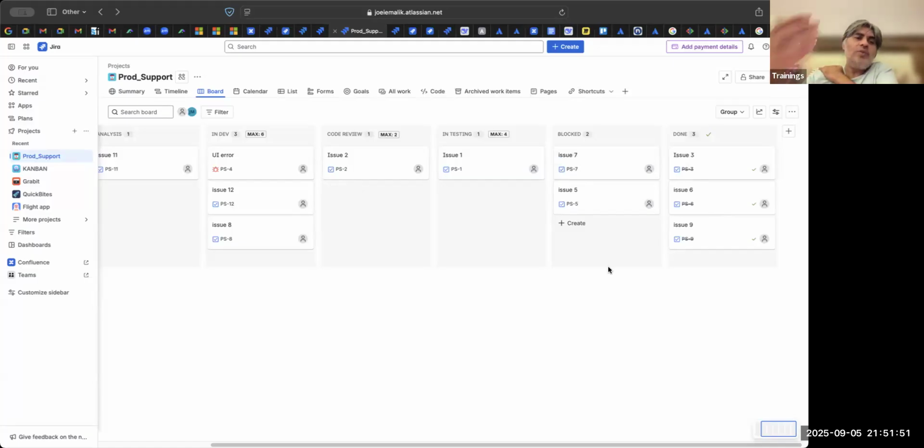So in a few weeks, you will hit an optimized flow where the maximum tickets possible will be going through, because you don't want any build up at any particular stage. You want things to move as quickly as possible to the done state. So at least in this case, you are able to tell the client that at least 3 critical items were delivered instead of only 1, which was the case before applying these WIP limits to these statuses.